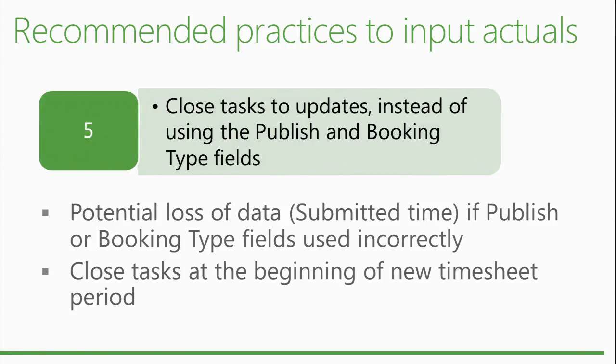But what if you have sub-projects, multiple projects linking together? Does it treat it the same way, or does it treat them as separate projects? I think it's going to treat it the same way. That's the way, basically, each task or assignment is processed. So it's not going to matter, really. What's going to matter is what's happening at the level of each task assignment. If you have 200 assignments for each task and it's a very long duration, each task will take some time to be processed. Yeah, that's what it is.